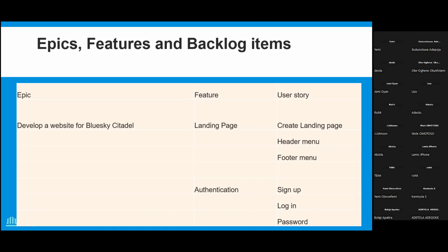No. But you see, they've gone further down to break it down to what the different aspects are that we're going to consider. The first one was landing page. The second is authentication. Now, the landing page feature has been further broken down into 3 user stories. The first one is to create the landing page. The second is to create a header menu. And the third is to create a footer menu. In the same way, authentication has been split into 3 user stories. The first one is sign up, then you've got login, and you've got password. The password one is like, maybe when you forget your password and all that.